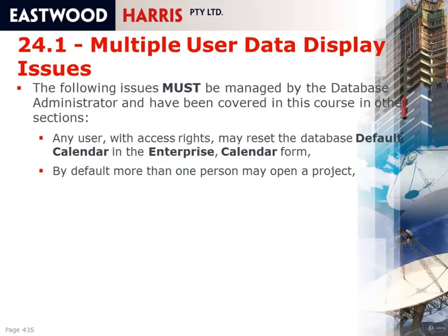There are occasions when it's useful to have multiple people operating one project, particularly in big shutdown projects where you have a large number of shutdown schedulers and you only have one project file. In that situation, you need to make sure that everybody's aware of the area of the project they're working in, and they should be given guidance as to what area is theirs, and they should only be able to work in that area. It is also possible to drive access down to WBS node level if you like, but once you do, the schedulers aren't able to schedule or put relationships between their WBS node and other WBS nodes. But that's another option.